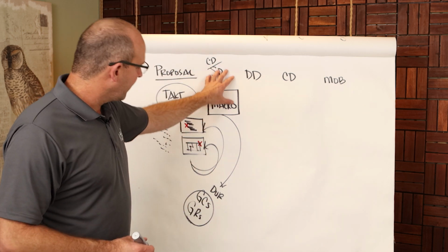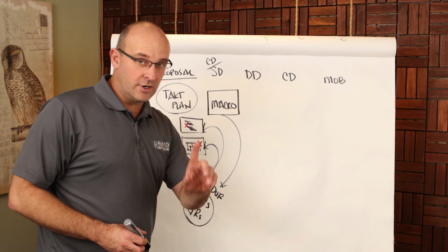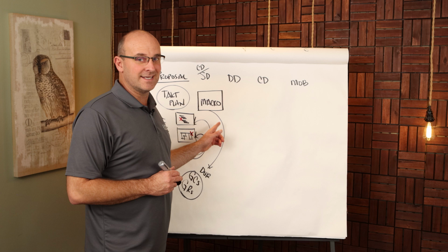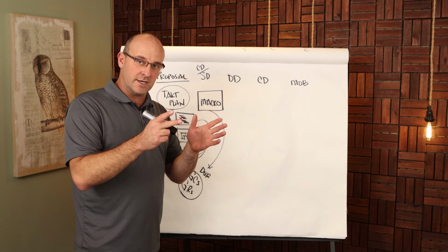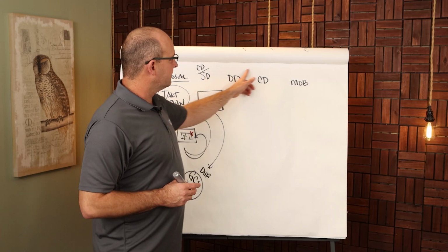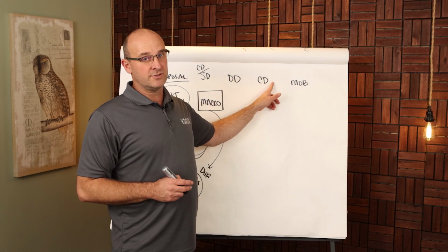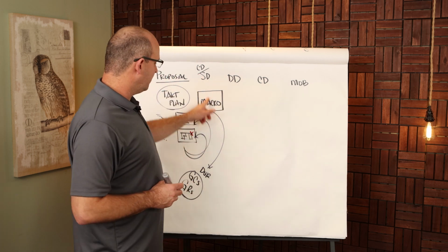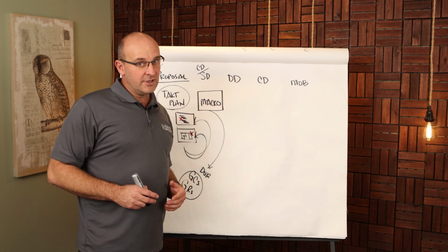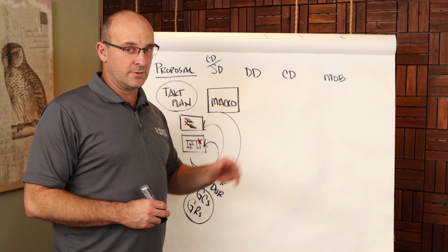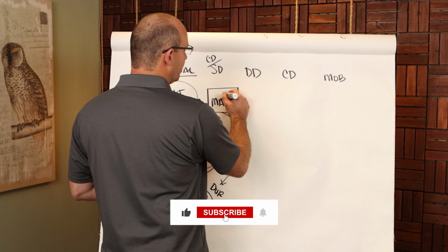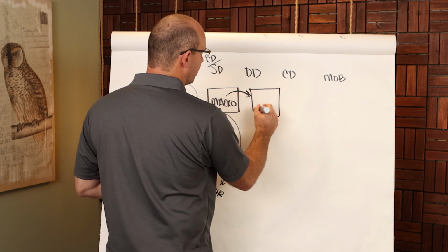So win the job and make sure that you have the right target for your overall total project duration. If you don't do this, let me just say, this is not just a nice idea. If you do this with CPM, you'll undercut your overall duration because it's not going to show properly. It doesn't have trade flow. And you're going to surprise your owner over here with additional money once you find out what the project is really going to take. If you create a macro level tech plan here, your duration is going to be more accurate. You're not going to have that value engineering surprise later on in the overall pre-construction sequence, and everything is going to go better.